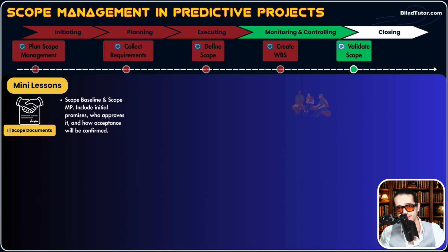Because let's say your deliverable is ready, your internal quality team verified that deliverable. Now it's time to show it to your customer. But how? Like, what steps you need to take? These are all mentioned in a scope management plan. That's why scope management plan is an input here. You go to that section, how to validate the scope, and you follow that instruction.